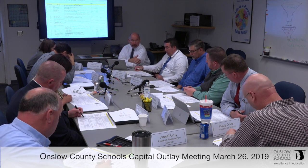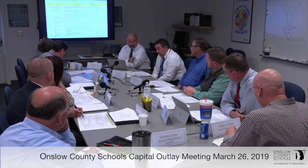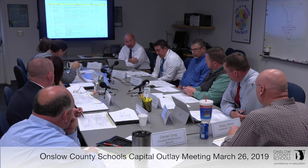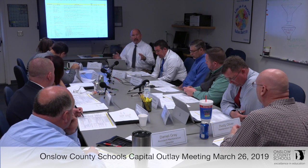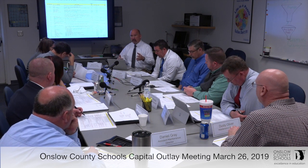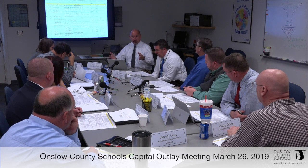One of the things we do with the roofing, just so people are aware of it, is when Dusty and Daniel go out there and look at the roofs, they actually physically go up on the roofs and inspect them, or have a team go up there and inspect them as well. They also look at the age of the roofs. A roofing system is a life cycle system, and after 20 to 30 years, we need to start looking at replacing. In that process, we're actually going up and looking at the roofs to get a better evaluation of them. It may be a 20-year-old roof, but it may be in the condition of a 30 or 40-year-old roof.